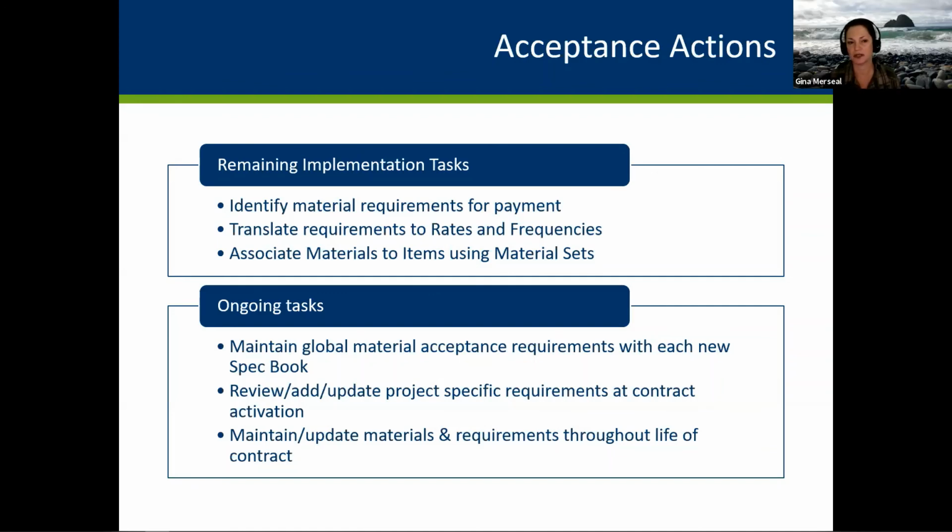And it's just as simple as that: the system will automatically generate those acceptance actions for those unattached items as well. And then when the change order is approved, it would generate them again, along with any acceptance that would have been made in the interim. For instance, whenever you have an unattached item added to the change order, you're going to know what acceptance actions need to occur. So it'll still record those samples and tests that are performed on it until that change order is actually approved. And then when the change order is approved, it'll still use those acceptance records to match that up. That was just the last piece of it.